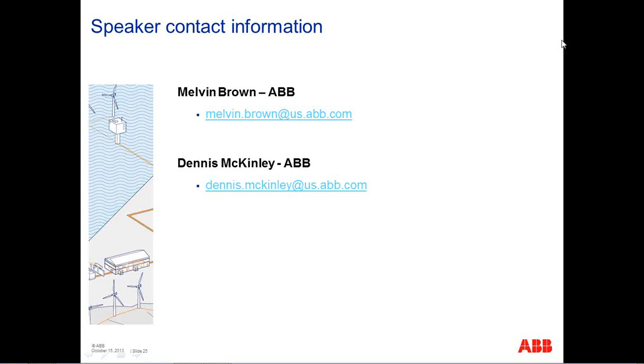Yes. You want to make sure that you have a firm that's going to be helpful to you initially, because there are a few studies that you have to do initially. You have to do your feasibility study, you have to do your system impact study, and that's going to determine what impacts to the utility system you're going to have to change in order to connect that wind farm to that electrical system. Sometimes those changes are very simple. You can just have a line tap connection, or sometimes you have modifications at the point of interconnect, but also you have modifications at the substations above and below the point of interconnect.